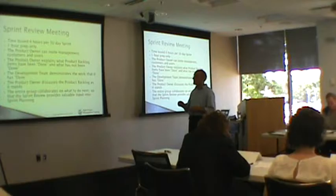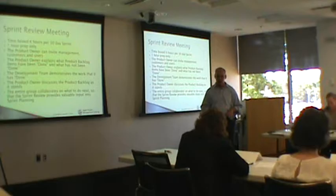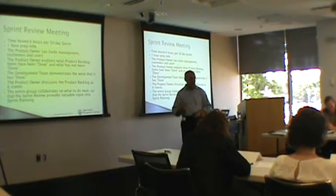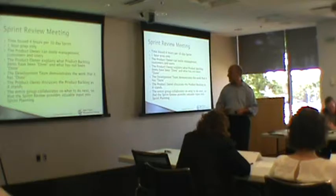The product owner explains what has been done and what has not been done — that's the product owner's job, not the Scrum Master's, because you're the one that owns that backlog. The development team demonstrates the work. This is an opportunity for the development team to show what they've done. This is not a sales presentation by the product owner.